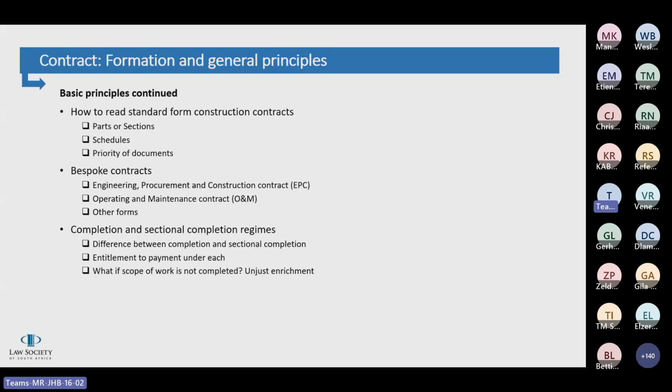So this interim payment regime is also designed to protect the subcontractor, and it doesn't only protect the contractor in terms of cash flow and to make sure that the project continues and that it can pay its expenses, but the subcontractor that is usually just performing, for example, 10% of the scope of work will be in a position to receive payment of the works once it is complete, and it doesn't have to wait until the end of the project to get payment.